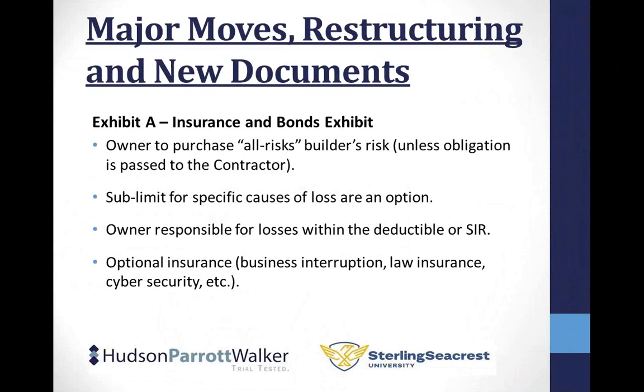So again, the one takeaway out of insurance is that all risk matters, because if the owner's getting the insurance, even if it's property, they have to get a rider that covers for all risk. That's a great point, because I would add that the term all risk is more or less meaningless. You can't buy an all risk policy in reality. This is very customizable, non-standard coverage. And that's one of the things that really throws people who are parties to this, because they think, well, the owner's got the same requirement I've got.